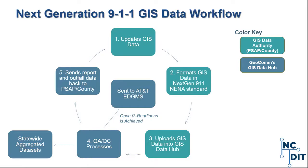Some examples of critical errors are road range overlaps and data falling outside the provisioning boundary. Once the data meets I3 readiness, Geocom will transfer that data into the AT&T database called the EDGMS, and also compile statewide data sets after each QA/QC process. This workflow is very similar to the one we have in place for creating the NC Parcels data product as well as the previous AddressNC efforts. Since the data is maintained by the local jurisdictions — the authoritative source — we want to create the next AddressNC data product from the data being inputted into the Next Generation 911 project.